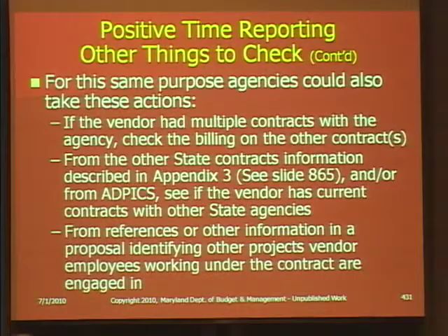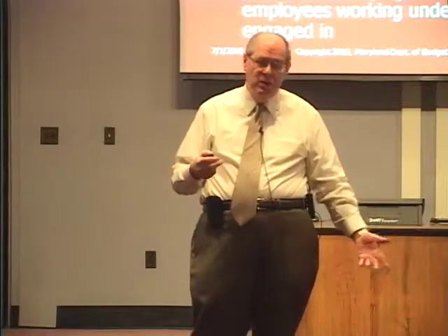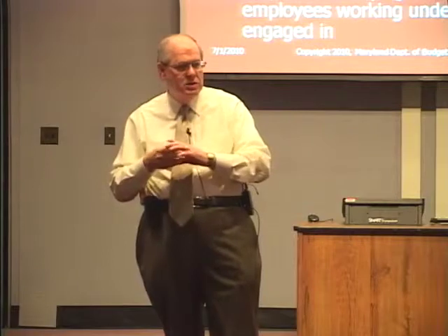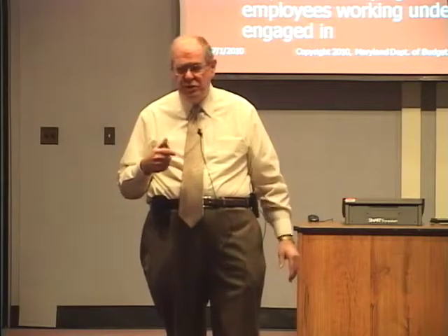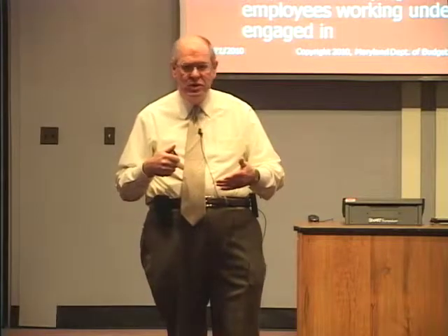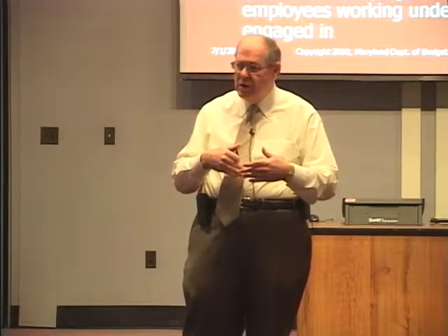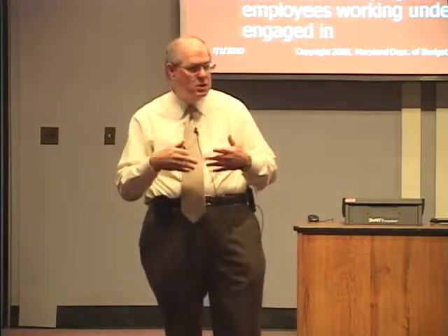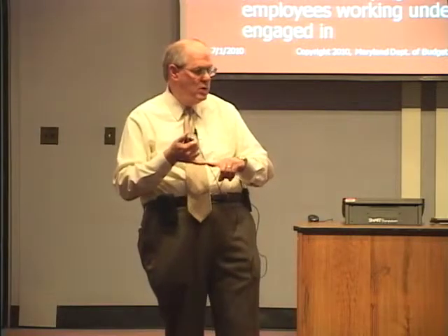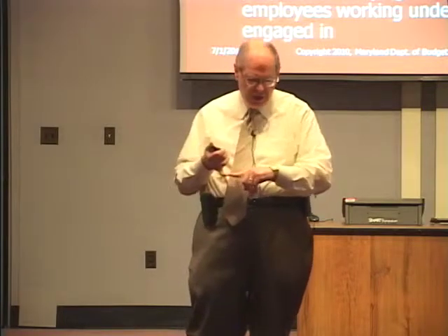And I can remember a very specific circumstance, when I was back here, reviewing a whole lot of contracts for, I think in that case, the Developmental Disabilities Administration with a bunch of vendors, the nonprofit organizations. They were required to have detailed line item budgets, and in many cases they had to list the specific individuals to be employed under the contract and the anticipated number of hours per week to work under the contract.